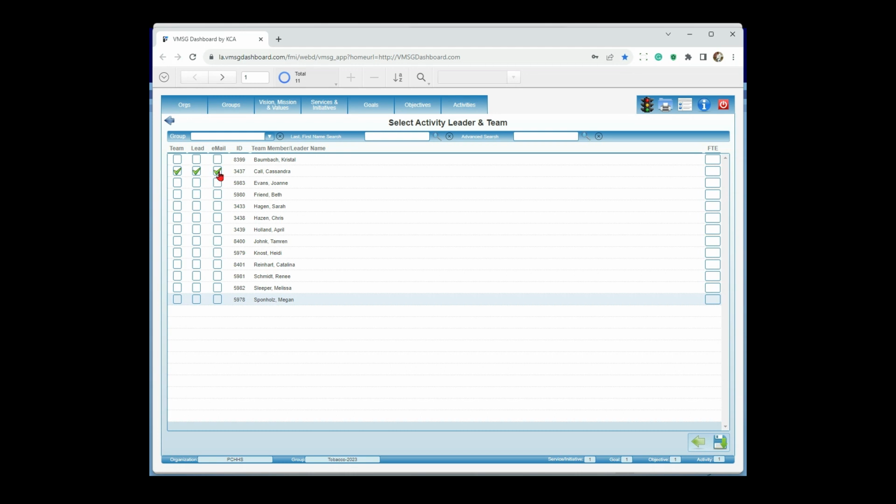So you're going to be the person who gets the real-time planning email to come back in and update this particular activity. You can also go in here and add team members, as many team members as you want. And you can actually have these team members get email notifications as well. Typically, you're going to have the team lead as the person who you want to do the update because they should be the most close to the project in this particular case.